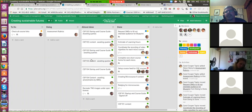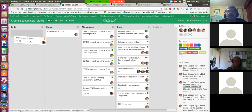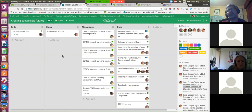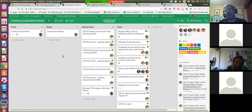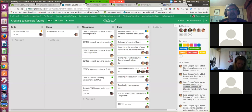Basically how this works is we would have an online session like this and we can move these cards around. This becomes an agile development process. In the early days, we attempted using traditional project management methodologies with Gantt charts, and we found that you ended up spending more time keeping the Gantt charts up to date because of the interdependencies within an open course design and development. We found that these Kanban boards are actually considerably more effective in helping us plan these developments.